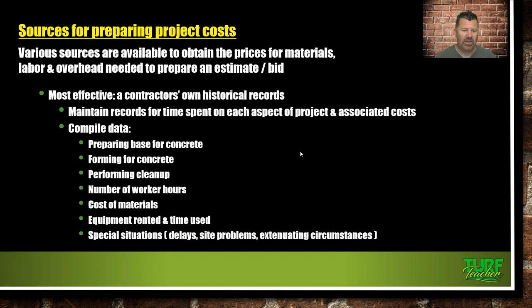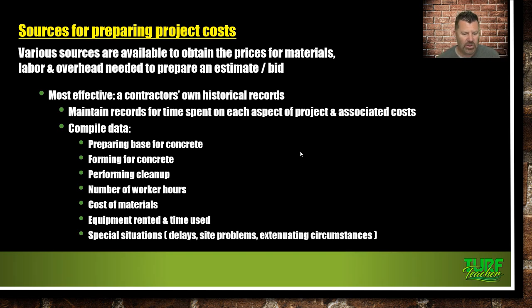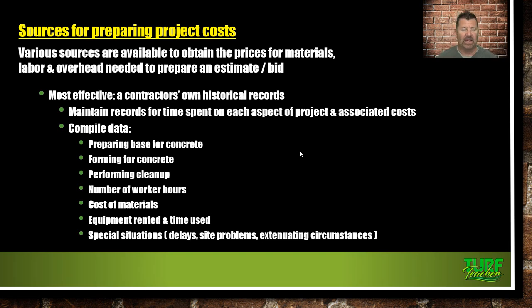Labor and overhead need to be calculated to prepare the estimate. Most effective is the contractor's own historical records — that's why monotonous work makes money. Maintain records for time spent on each aspect of a project, compile data to establish base times for tasks like forming concrete or performing cleanup. Track costs of materials, equipment rented, and time in special situations like delays or site improvements. If you're doing a 30-day job and it rains 5 days, plan for 35 days on the next similar job.